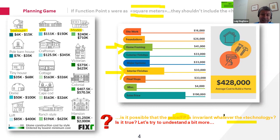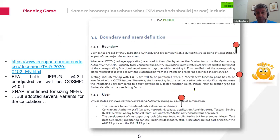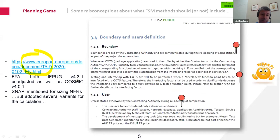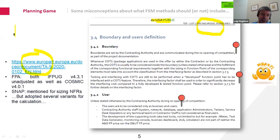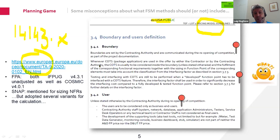For many years — 40 years since the creation of function points — Dr. Albrecht and others have spoken about function points as if they were square meters. But according to the same number of square meters, why should prices differ between a tree house, a colonial house, or a Victorian house? Because there are other elements beyond solely square meters. Quantity and quality together return the final results of our project. A very recent European project called EU-LISA introduced not only IFPUG but also COSMIC functional sizing.